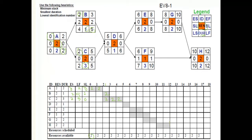We must make a decision between activity B and C. Using our priority rules: minimum slack first. Activity C has slack zero; activity B has slack two. The logic suggests prioritizing activity C — so activity B cannot take place here. We give preference to C, and activity B is deferred to a later time period.